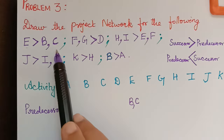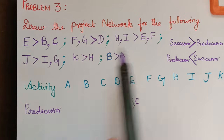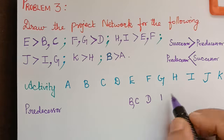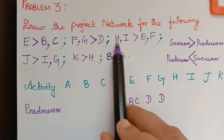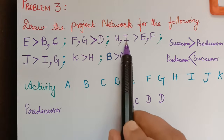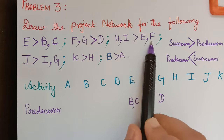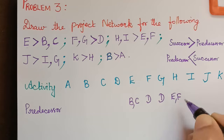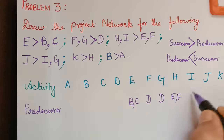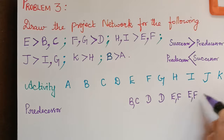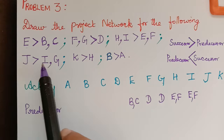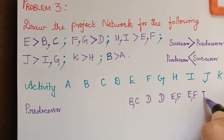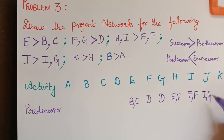For activities F and G, D is the predecessor. Then for activities H and I, the predecessors are E and F — so for H we write E and F. Activity I and G are the predecessors for activity J.